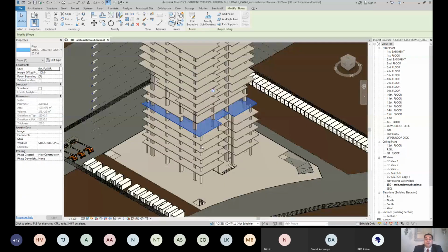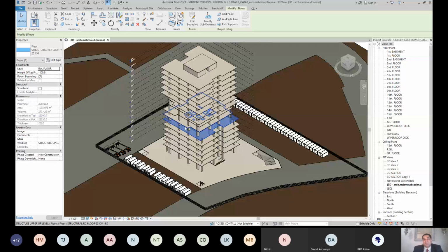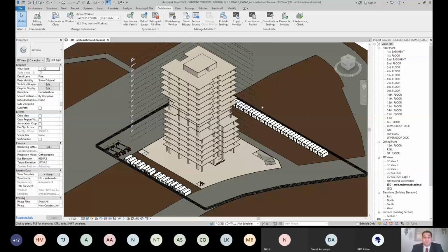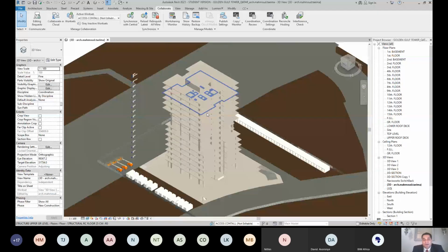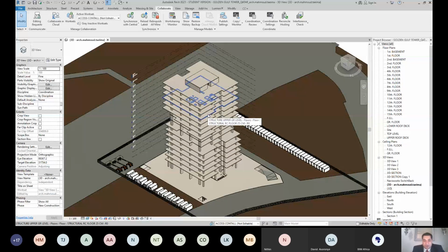To get the data or work between these 3 programs, the name of every activity must match, because you may have many thousands of activities for any building, or 100, or like this. If the name is the same, it will be easy to make everything. And the arrangement will help you finish the work as well.